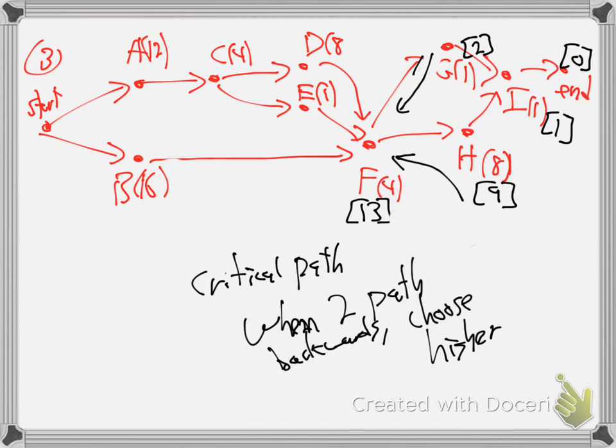So you have 2 options. Don't do them both. A mistake students often make. This is one of the small points that people miss, so I'm trying to be as clear as I can about it. That's how I learn to be better, because I watch what people mess up and I emphasize it next time. So that really gets people. Everybody hearing me on that? When you have 2 paths to go backwards, you don't do them both. Students will go, oh, I'll just do both, 9 to 11. No, you don't do them both. You do the higher. Why?